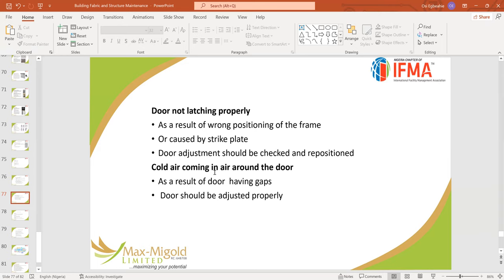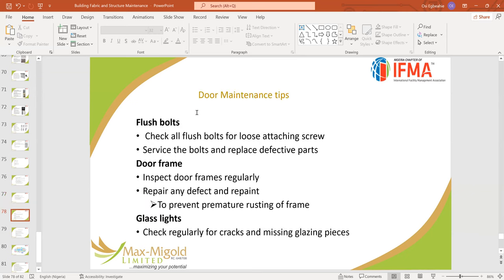No matter how rushed the project is, especially when you are producing a door, allow the wood to go through the normal seasoning period or the normal treatment period to ensure that the wood doesn't bulk when the door has been installed. That also goes for every wooden component in the house, either the doors, the kitchen cabinets, or the wardrobes, or the shelves, or whatever you install. And normally we have the same problem.